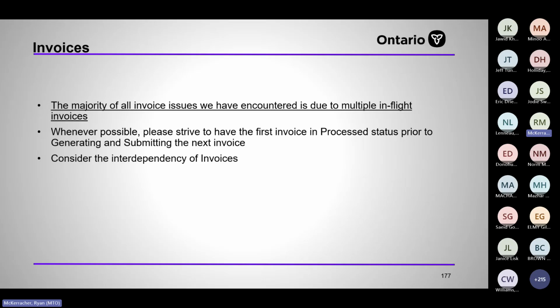The reconciliation, I should have mentioned this during the reconciliation module, also serves as our notice of non-payment. So the Construction Act states that the owner shall furnish the contractor with any quantities submitted for payment that they won't be paying. So if the contractor submits 12 and we say we're only paying 10, we have to give them a notice of non-payment stating that you're not getting paid the full 12 that you wanted. That is our reconciliation. It shows our amount, their amount, and what the final payment amount is going to be, with an acknowledgement box for them to tick beside it. And they have to acknowledge each item line by line.